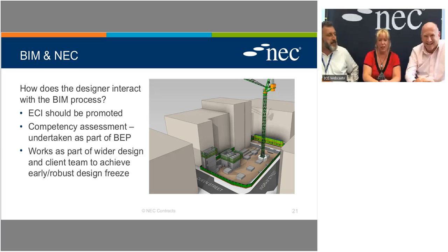We then get into very sticky subjects of quality. And that's why we talked about the BIM protocol and the BIM execution plan very early on in my slides. Within that BIM execution plan is the design competency assessment as regards who's got the relevant training and qualifications and the right common data platforms to be able to actually engage in BIM. So it's not one of those, I'll agree to the job and I'll go back and Google how I can do it. You've got to pass that formal assessment, and that's a formal part of making sure it's part of the quality assurance process.